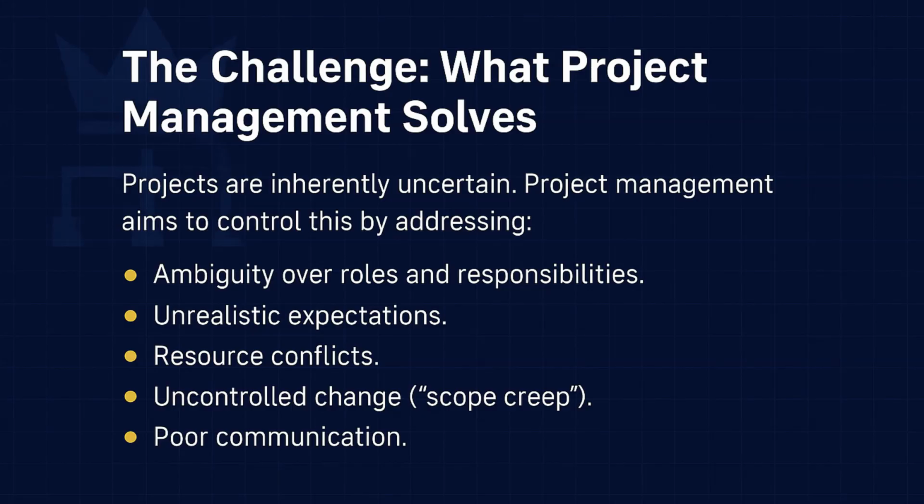Its aim is to do the bare minimum necessary to answer the question, do we have a viable and worthwhile project here? Does it align with strategy? Who would be involved? Is it feasible? It prevents wasting effort on initiating projects that shouldn't proceed. Okay, so SU is the initial filter, if a project idea gets through that.